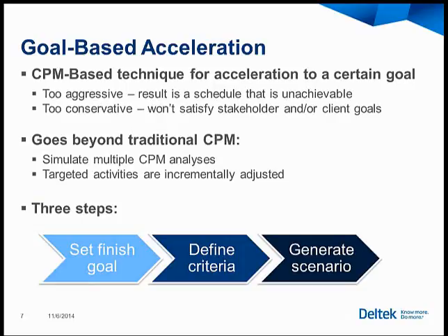We patted ourselves on the back for this advanced technique of giving what the engineers called a haircut on their durations. And the unintended consequence of that 10% haircut was that on the next project, or even later in the estimates of this project, they learned to pad their estimates by 10%, so that when they took the 10% haircut, they got to where they really wanted to estimate.